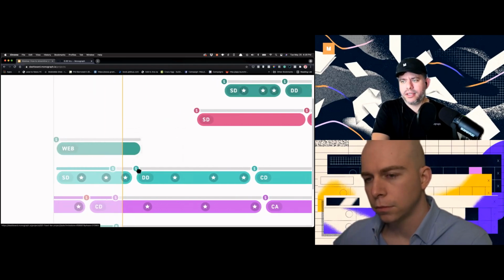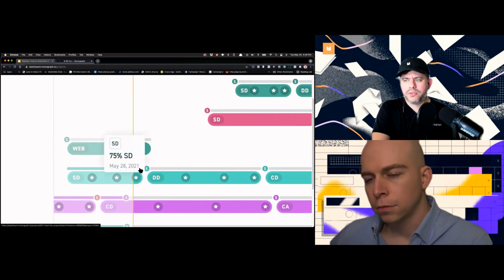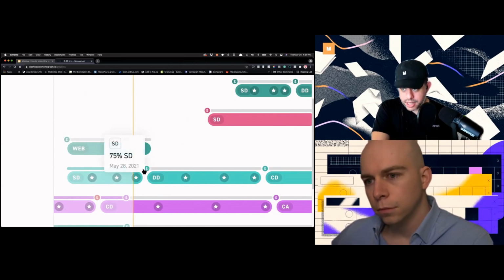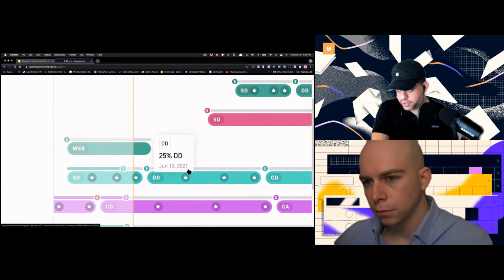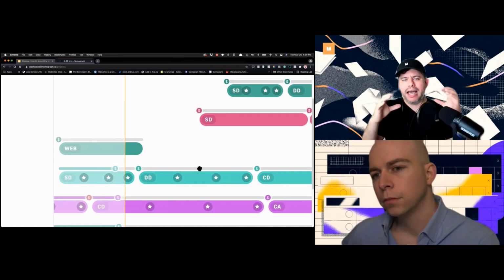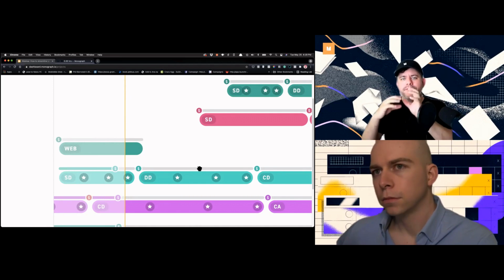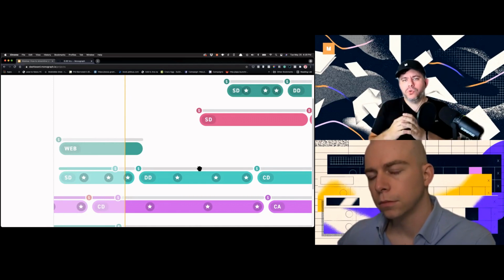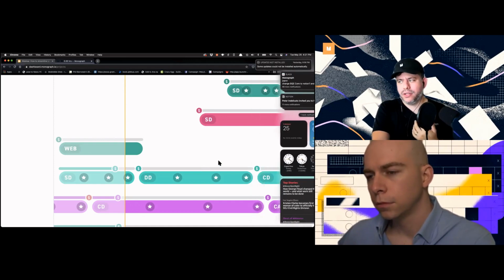The one key thing here is the money Gantt, which is this line that hovers over each of these phases. It's the allocated budget for that phase, and it moves in real time to the time that's been allocated to it.